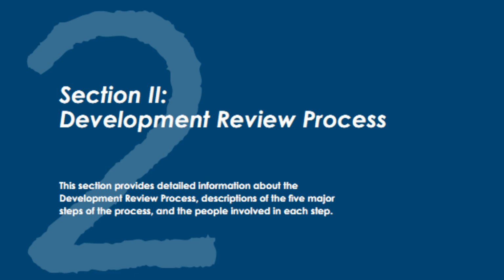Complex projects involve multiple city departments or agencies reviewing the application, performing an environmental review, and a public hearing for approvals. Simple projects only require a brief application review, that is, building permit or administrative planning permit plus building permit, with city departments at the one-stop permit center, and do not require the full development review process. Environmental review and public hearing.